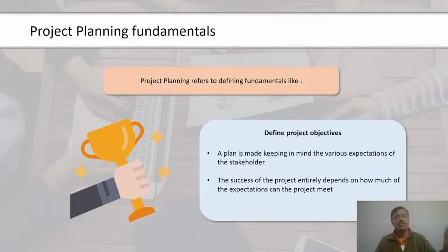One more thing we can notice is, the Gantt chart is starting with some other date and not with the dates that we had entered. So for this, we will copy the first date in some other cell, then clicking on the copied cell, we will go to the home menu to select the dialog box as shown in the figure. Then in that drop down menu, we will select the number option. We can now find a value displayed in the copied cell. We will copy that value, click on the dates on the chart, and as the Format Axis dialog box opens, we will paste that value in the box that says minimum, shown in the figure. As a result, we will have a final Gantt chart on the screen.